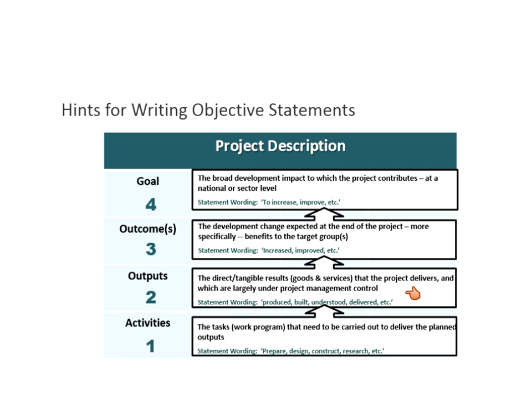Now, I didn't mention the difference between project and program here. Maybe I assumed that most of you would know, but there can then be a program goal that would be above a project goal. So let's assume that this is the hierarchy of objectives for a project. You might then have another level that would be a program goal, and you might have what's called nested log frames. You might have several projects that would feed into a program. And likewise, you could have programs that feed into portfolios. So you can have a nesting of log frames as well.